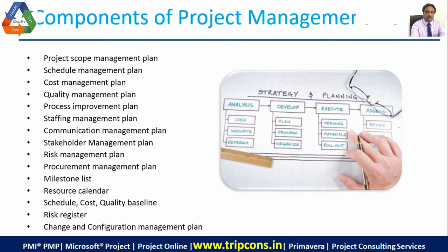Then the staffing management plan. Do you think the project has a maximum number of people at all times? No. When does the project have the maximum number of people? When it is in the execution phase, isn't it? That is where people are doing the work which has been planned out, so you would use the maximum number of resources there. The staffing management plan would tell that.